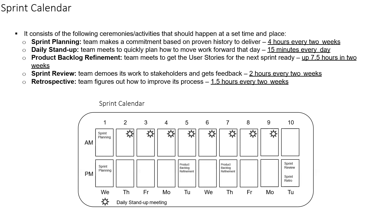If you are following a two-week sprint cycle, your product backlog refinement meeting ideally should not be done all at a stretch, as otherwise it is going to take an entire day. You can break the product backlog refinement meeting into two different sessions, and it should not take more than eight hours in total within a sprint. At the end of this meeting you should be ready with the list of priority PBIs or user stories for the next sprint.